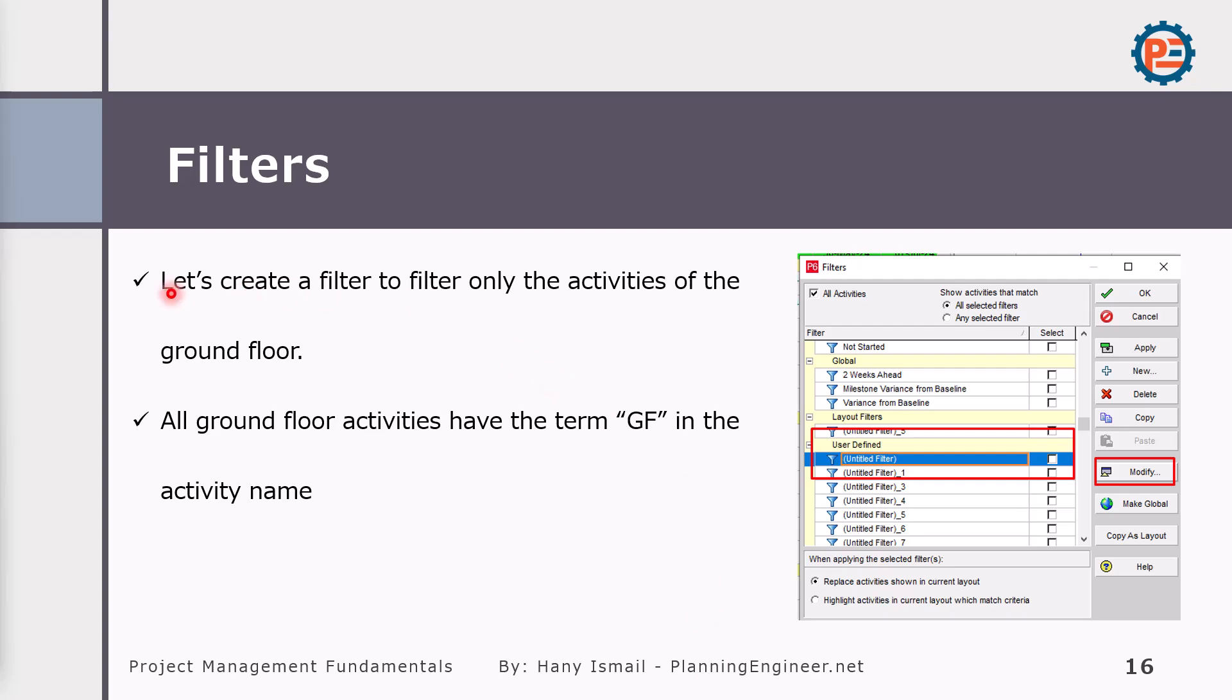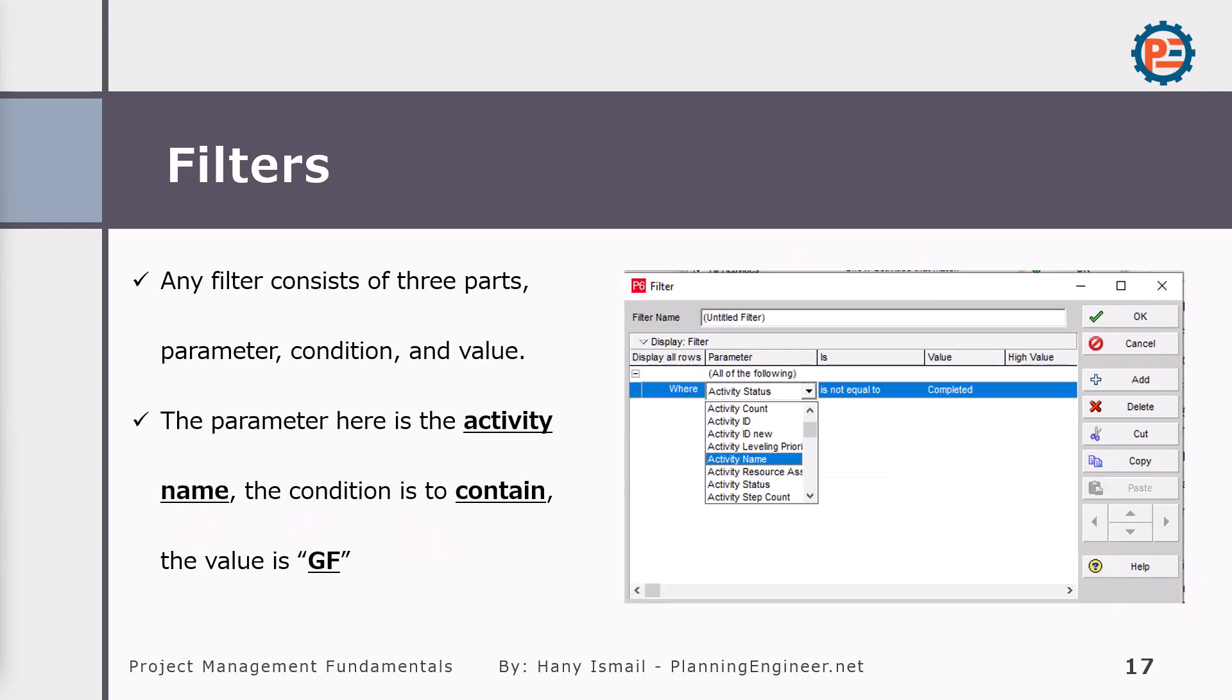We can check another filter which is text. We need to filter only the activities for the ground floor. In this schedule, all ground floor activities have the term GF, which is a shortcut for ground floor, in the activity name.